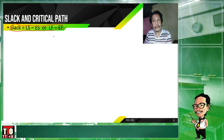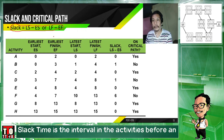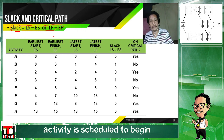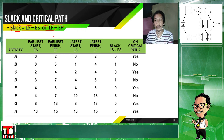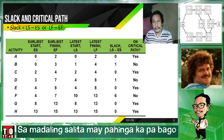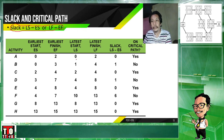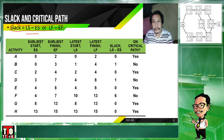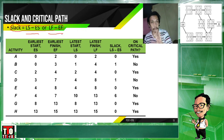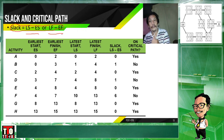Okay? If you have the node values from the nodes section, it's there. Now, looking at our forward and backward pass values in the network: you could choose to use either LS minus ES or LF minus EF. Okay? You could choose between the two, but don't interchange them. For example, don't do LS minus LF or LS minus EF. No. It's either LS minus ES or LF minus EF.